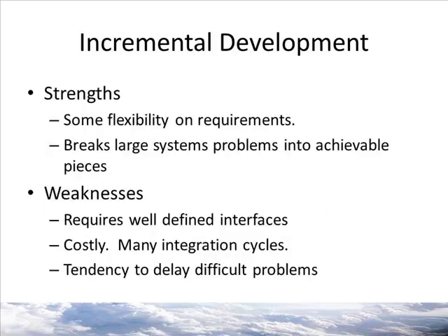The strengths of incremental development are that it does give you some flexibility on requirements. You've got functionality and success along the way, and you don't have to wait 5 years till the whole thing's implemented. It also breaks large system problems into achievable pieces. You can tackle one, tackle the next after that. And if you run out of money or if something becomes obsolete, then at least you've got the functionality of what you've already implemented. The weaknesses are that it requires really well-defined interfaces, and SAP certainly has that.